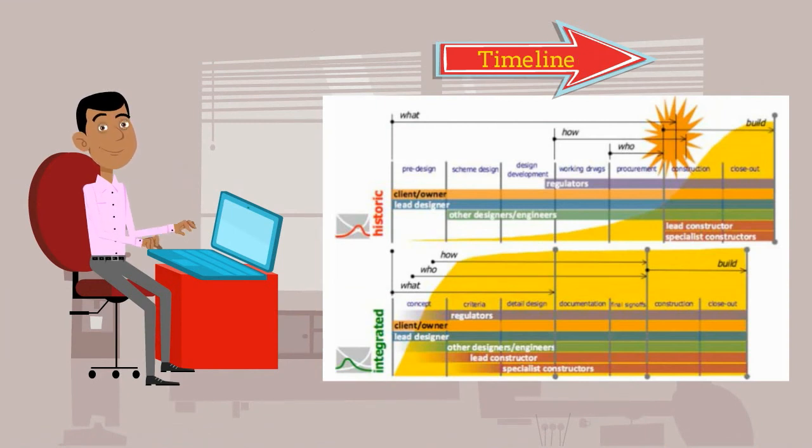The yellow part depicts the shared understanding of the project. So, in IPD projects, the know-how is shared during all the time from the project concept. Instead, in classic projects, the information is shared only when the constructor comes into play.